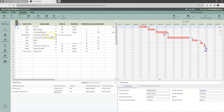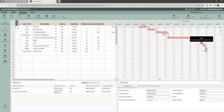Once I accept this plan at the end, this date will not move — I can only move it manually. It's not moving with the project. So if we get behind, this is not going to move forward; the projection will move forward but this is locked in time. We really want to focus on getting here first from an engineering perspective, and then the rest of the project will follow.